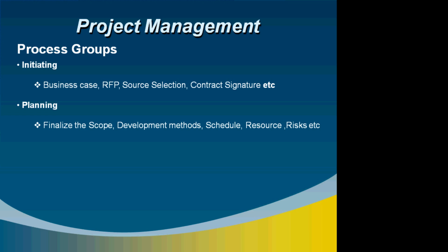We will understand more details on the scope management videos. Development methods: finalize the development methodology, whether it is waterfall, agile, etc. Each one has its own advantages and disadvantages. For example, if the scope is not clear and will change frequently, it is better to go ahead with the agile methodology.